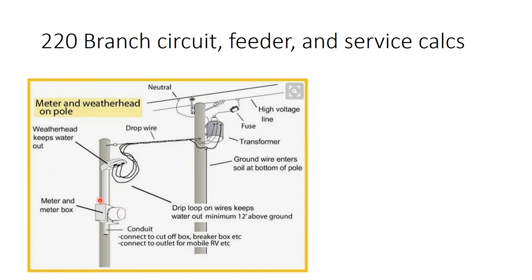But if you're establishing a brand new electric service, generally you'll spec out the meter box and have to check with the utility if it's a ring or a ringless. And then you put the pole up with this little crow's head, and run the cables, enough cable to come up here. And the utility will come around and they'll hang a transformer, establish the new electric service off the power lines, come across, and then tap on to the cables inside or right close to this weather head.